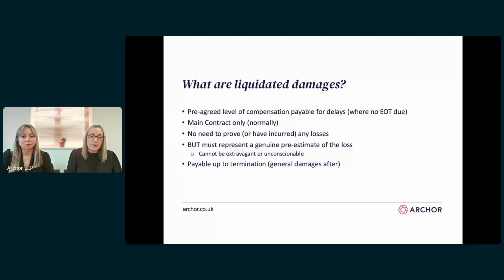The benefit to an employer of including liquidated damages in a contract is that there's no need for the employer to prove that it has incurred any losses. Rather, the amount of liquidated damages is automatically payable, but the level of liquidated damages set out in the contract must represent a genuine pre-estimate of the loss.